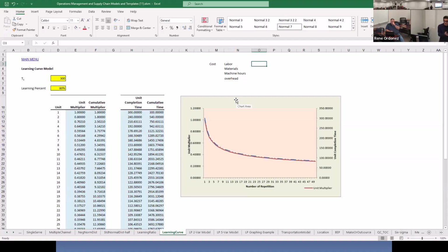Because if you underestimate your labor hours, translation, you will put in lower labor cost. If you have lower labor cost, typically the labor hours are applied to machine hours. Okay, materials, that's easy because it's not based on labor, it's based on the 18 jet aircraft. But labor, machine hours, overhead is a function of labor also. Sometimes, let's say, overhead is like 30% of total cost. So if you underestimate labor and machine hours, directly affected by that, your overhead is underestimated. Your total cost is underestimated. Therefore, your bid price will be lower, right? Yes, you will be competitive, but you might not generate profit.